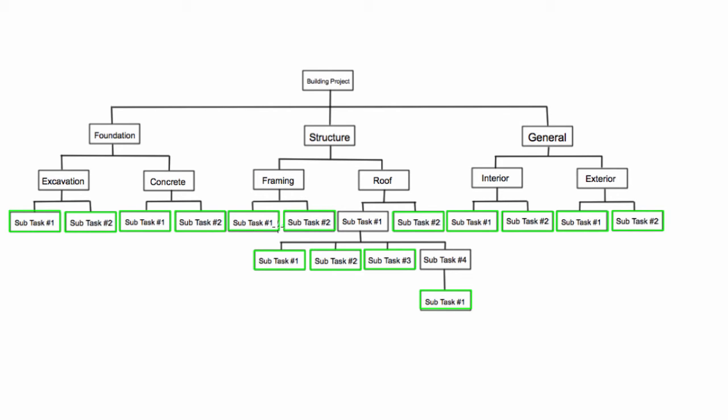We can then put them into a table of dependencies and start figuring out which ones might have to happen first and how long we expect them to take. So all of the ones here at the end of any branch I have highlighted in green. These guys will form our activities in the Gantt chart and network diagram.